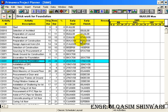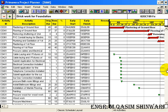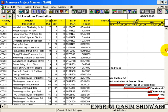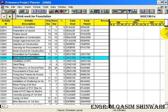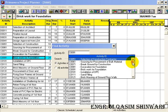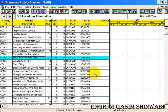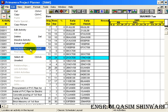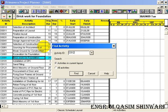You can also add more than one successor for an activity. It all depends on the project manager — he can visualize how many activities can start at a single time. Let me add three activities for the curing of first floor. There are many activities and they are not sorted, so to find a specific activity press Ctrl+F on your keyboard. The Find Activity dialog box appears and you can click on any activity to see its Activity ID.